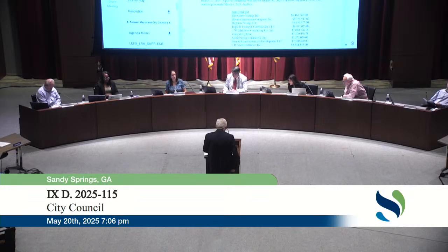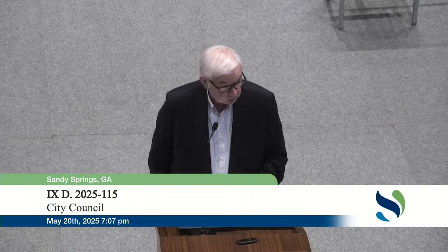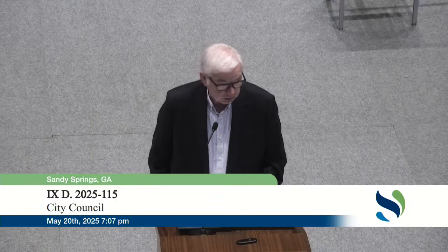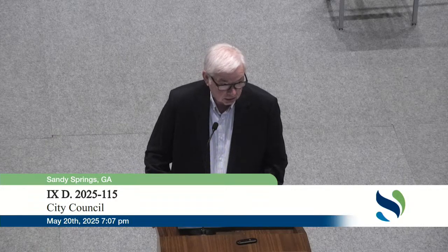A little background: on May the 21st of last year, MDS Technologies, our consultant hired to conduct our PCI survey of city streets, presented its findings, and along with those findings, provided the city a 3-year paving program based upon PCI scores at the time. FY 2025 would be the first of those 3 years proposed in MDS Technologies' PCI-assessed paving plan provided last year.